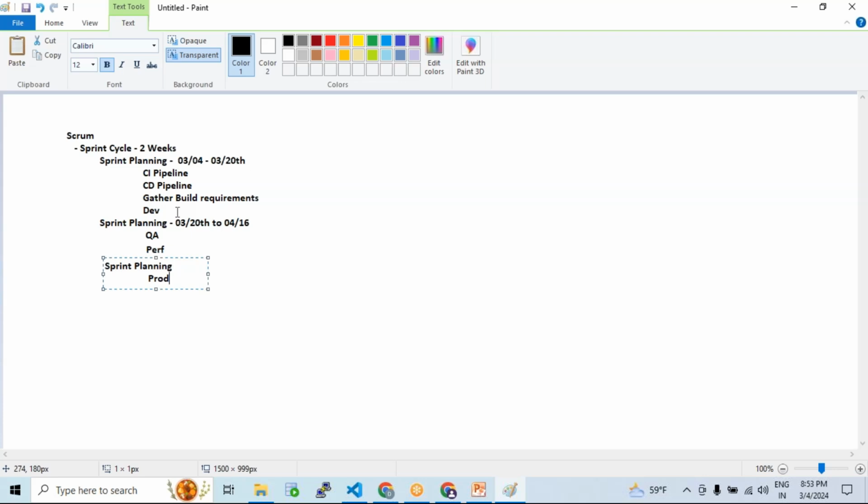You getting me? So within 8 hours, 8 into 5, 40, right? And 40 hours is for a week, and 80 hours is for 2 weeks, right? So within 80 hours, how much work can you do as one individual, that something has to be planned, measured. We can't give you the overburden, and we can't give you less work as well. So we should know exactly how much you can deliver within 8 hours of time. So how can that be measured by your manager.